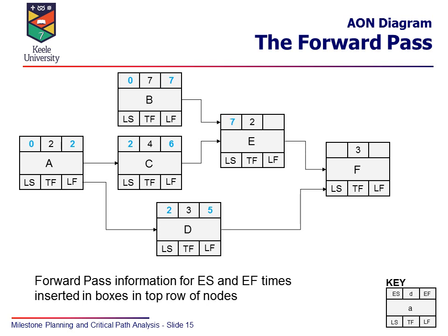Activity E can only start when B and C have finished. Activity C finishes on day 6, but activity B doesn't finish till day 7. So we have to take the higher figure, because E can only start when B has finished. It can't start until that's finished. So its earliest start is 7, duration of 2, earliest finish 9 days. And then we just move that forward.